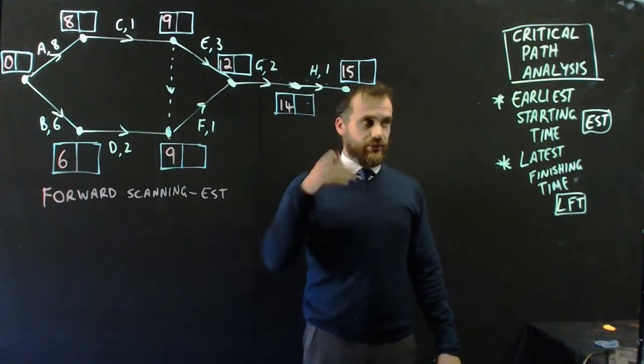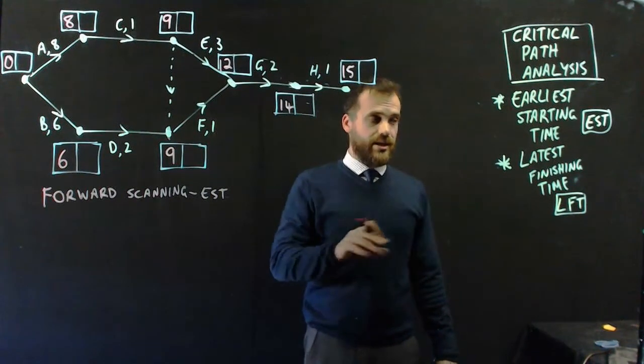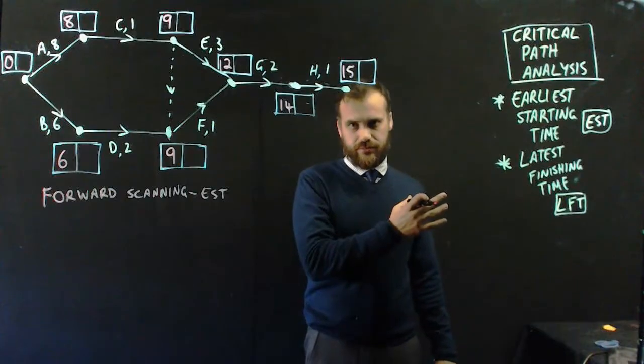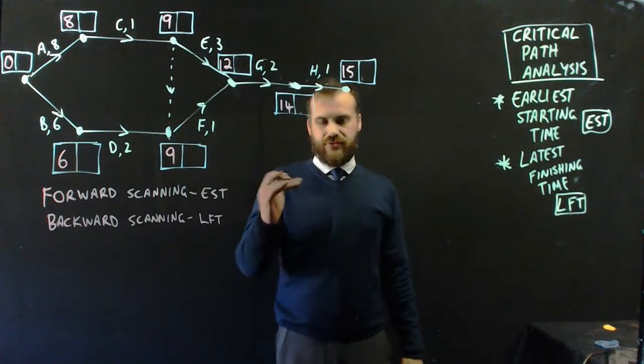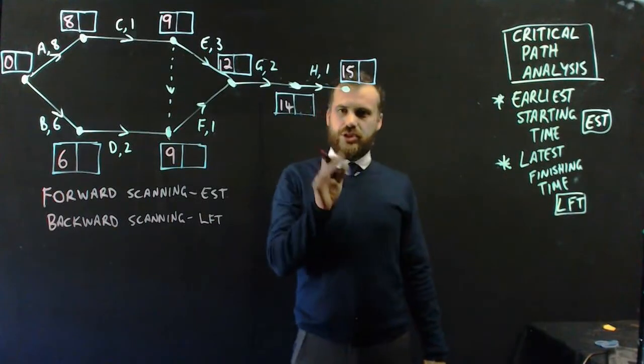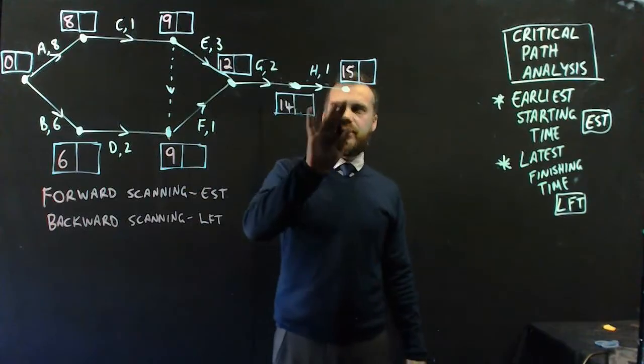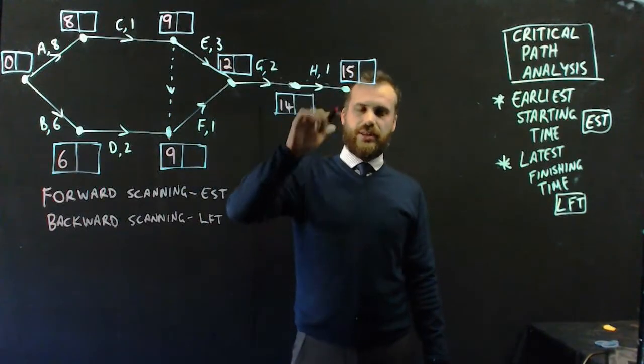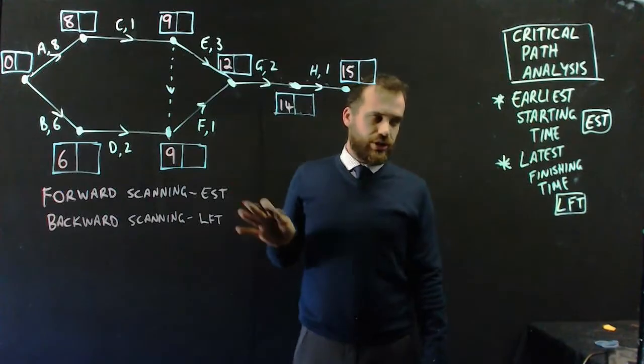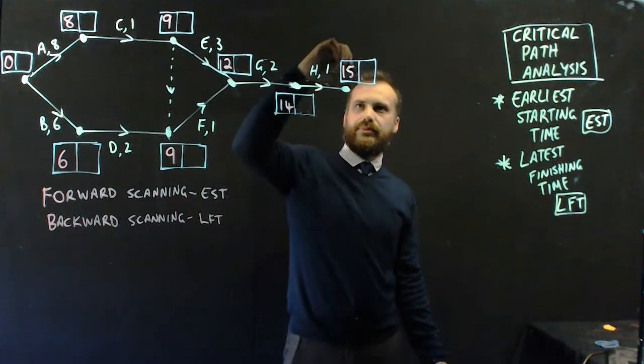That was forward scanning to find the earliest starting time. Obviously, I can now use backward scanning to find the latest finishing time. How do we think about latest finishing time? Well, first of all, this box here is just going to be like when the project finishes. And the project finishes after fifteen hours, right? That's the earliest that we can possibly finish it. It's also the latest we want to finish it because we don't want to go over time.